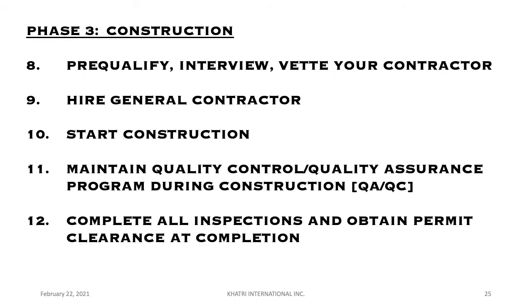Make sure they have all the right insurance. If your project is a big project, big is a relative term, I'm going to say anything over 20 balconies starts to get to be pretty large. There's a lot involved there. If you're doing work that involves more than 20 balconies, I would highly advise that you consider hiring a construction manager, a professional who can guide you through this process, because it will be very time consuming. It will be very labor intensive on a board member to manage this. And unless they're construction people with a construction background, they could very easily get lost in the process.